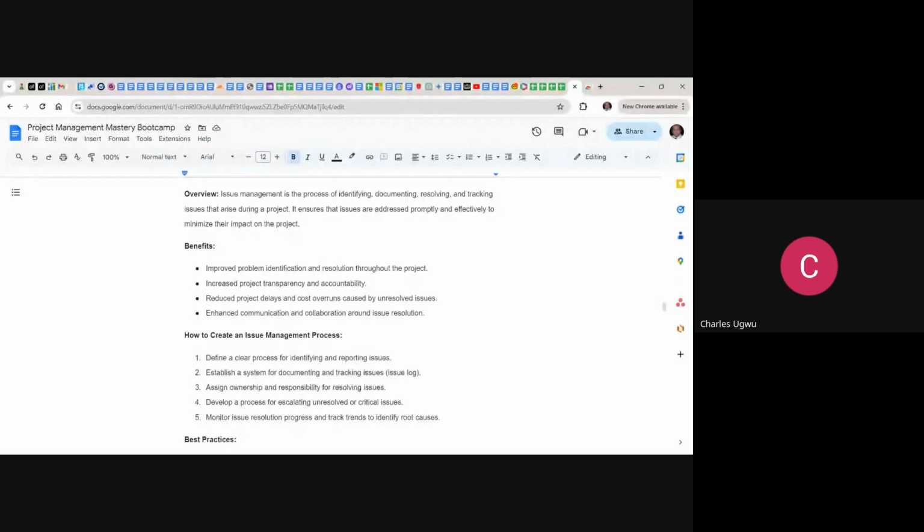But when you have an issue, eventually it becomes a risk, eventually you couldn't control it and it happened, then you must have an issue management plan. If I'm managing a project, I must have a contingency fund. If I have 10,000 pounds to run a project, that is the budget. If I'm starting that project, I'll start with 7,000 pounds as my budget and keep 3,000 as a contingency plan. If eventually I run out of that 7,000, then I can fall back on the rest 3,000, which is a contingency plan. And the program manager or the stakeholder will not even find out that I've got a situation because I've got the situation under my control.